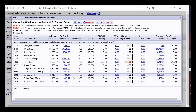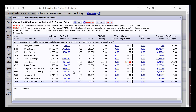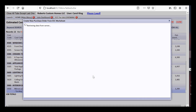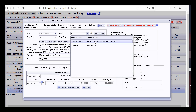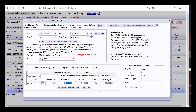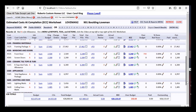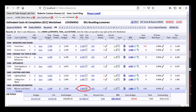Let's also issue a PO for mirrors and glass for less than the budgeted amount — say $1,000 from Fashion Glass and Mirror — with the checkbox to use the lower PO for the ECC. After resubmitting the allowance search, the mirrors and glass ECC is now under by $118. In the Allowance Over/Under Analysis, you now see a negative (credit) amount for mirrors and glass. CHS is smart about preventing double-dipping: if you do a change order for an allowance overage difference, it will subtract those change orders from the allowance adjustment so you're not charging the customer twice.